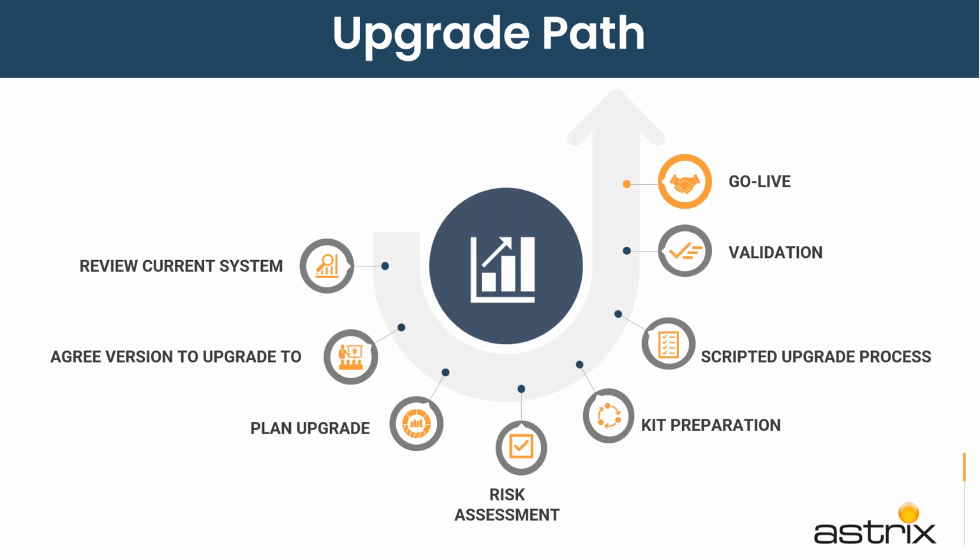That's where you have to decide: is it a 6 months plan, is it a 3 months plan, how long do you need, and what are the different stages? When is the cutoff happening, when is the actual validation, when is the actual go-live happening, how long is the hypercare period planned. All these things need to be done in this planning phase.